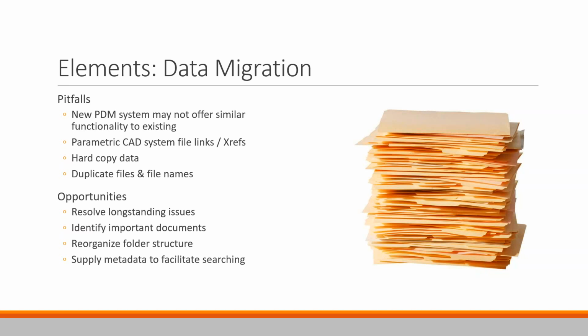So that's a huge potential pitfall, and that's usually what takes the most time in the data migration side of one of these projects: to clean up that data and get it into Vault. And then potentially hard copy data. If you've got drawings sitting in a cabinet, it's not trivial to get that data scanned and put into a system. So, data migration can take a long time. It can take a lot of effort, but there are huge opportunities as a result of this process.